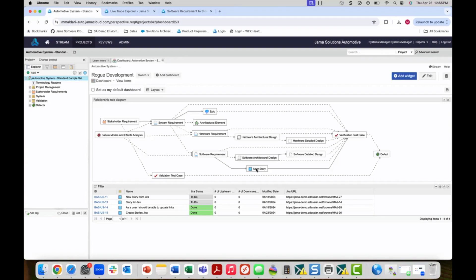By defining our traceability model, we can easily track exceptions and identify rogue activity. In this case, I have found four user stories that have been created without an upstream link to a software requirement. I can then investigate the cause for this and remedy it as needed.